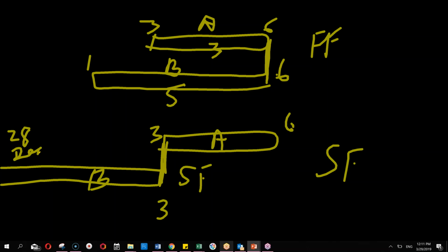So you see, what is the difference between finish to finish and start to finish? In finish to finish, I take 5 days and I finish on 6th. Although in start to finish also I'm finished on 6th, the parallelism between the activities has been reduced. B has gone even backwards. That means I can safely do the A activity without any interference, without fear of resources being shared by B or something like that. So it is less risky, and although start to finish is almost impossible, it can be done.